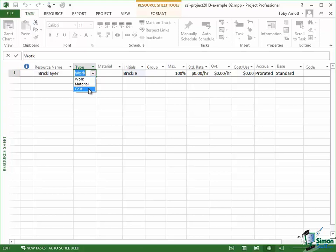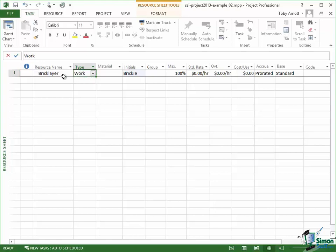Now the way that these three different types are used within Microsoft Project are actually quite different and particularly when we get to the area of working out costs, the way that the three of them work is very different. Let's just stick with work for the moment. Then our bricklayer as a person is a type of work resource.